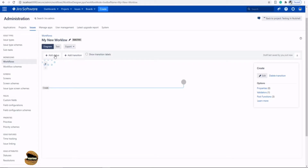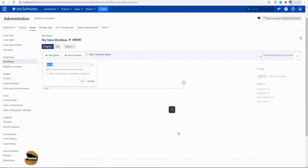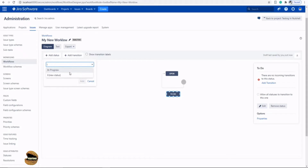You have two options: view the workflow as a diagram or as text. You also have two options to add a status or add a transition. From state-transition concepts, statuses are the states and the movement between them is called a transition. Let's create a status first — mark it as 'To Do'. The suggestions displayed are from existing statuses in your Jira instance, or you can create a new one. Click 'To Do' and click 'Add'.